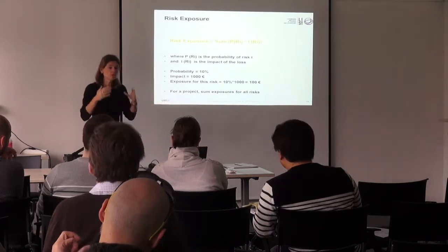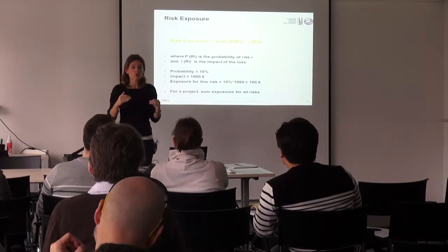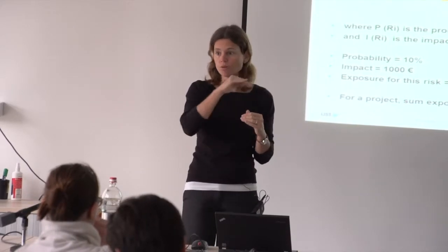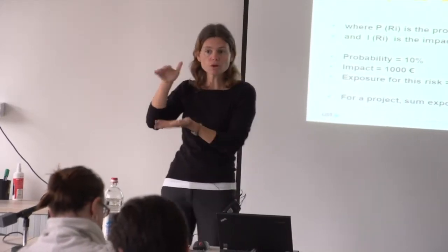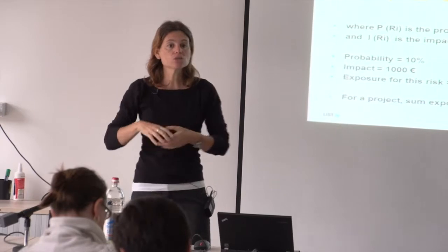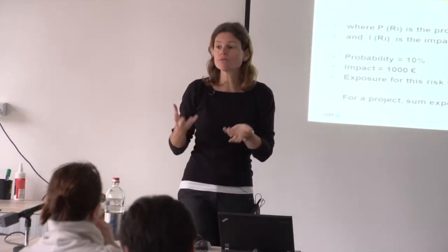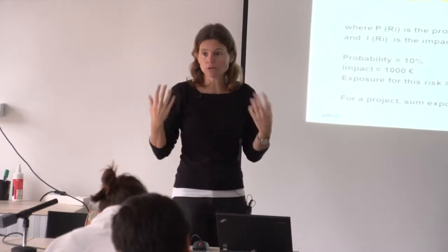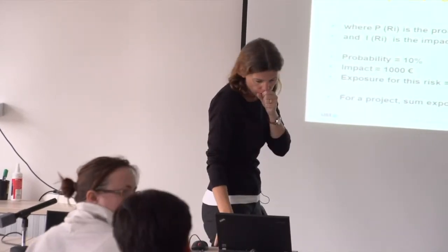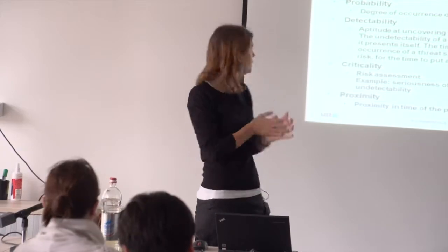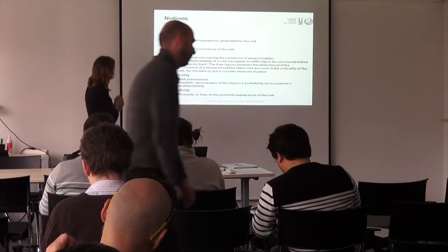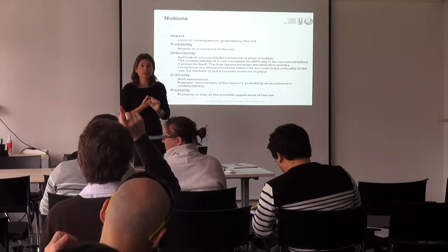So what you do is you have the list of all your risks on a project. You try to compute the exposure for each of that risk, and then you sum all the exposures. And so you have the amount of money that will represent the exposure of that entire project. Okay? So if we summarize on the different notions, the notion of impact, yep.